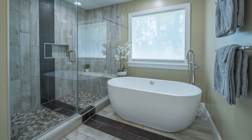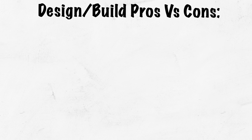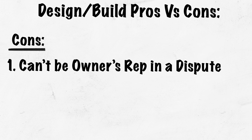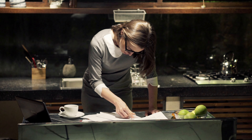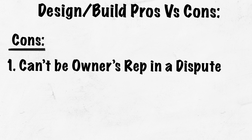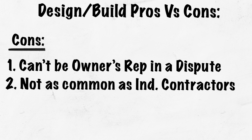For more complex projects, a design-build team is really good because there's a lot more value built into the project at no extra cost. But the downside is that the architect and contractor cannot serve as the owner's representative — so if there is a dispute, the owner has a dispute with both the contractor and the architect. Design-build teams are not as common as finding an architect or contractor independently, though some architects may work with contractors they've collaborated with for years.